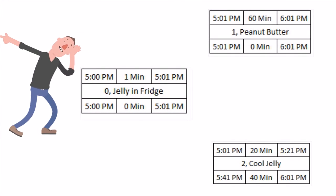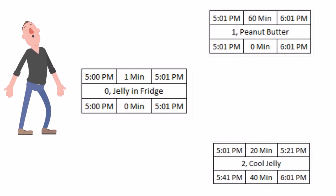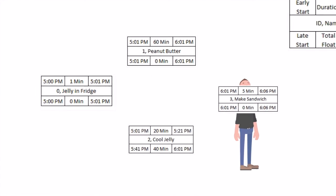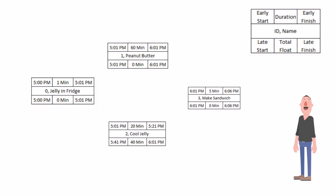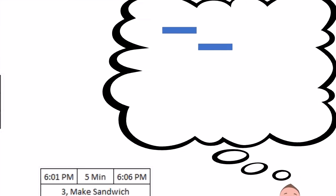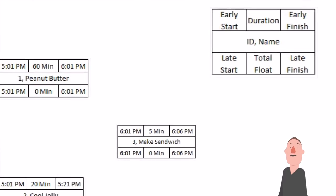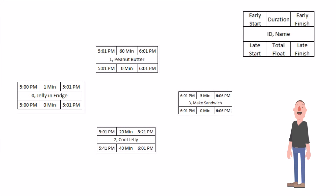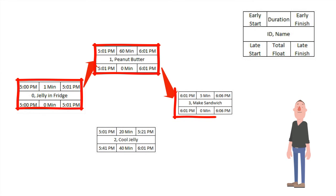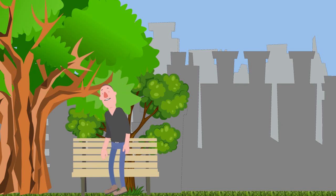So why in the world did we do all of that? Schedules used to be calculated by hand this way, and they were done so because this allows us to find what's called the longest path on the project. Simply put, the longest path is the sequence of activities where if we delayed even one activity in that sequence, it will push out the project completion. So let's look at our PERT schedule. We can see that the longest path on our project starts with putting the jelly in the fridge, then moves to going and getting our peanut butter, and then to making our sandwich. Those all have zero minutes of float. If I were to delay any one of those activities in that sequence, it will directly impact when I can eat my sandwich.